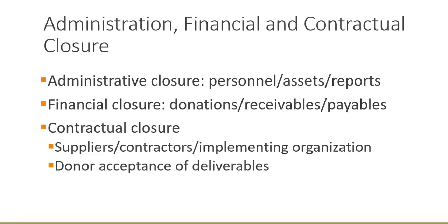Any parties involved in contracts, such as suppliers, contractors, the implementing organization itself, have all contractual obligations been fulfilled and are all contracts closed? And again, does the donor accept the deliverables? Does the donor in writing say that we understand the project has come to an end and we accept the project and the deliverables as they are?